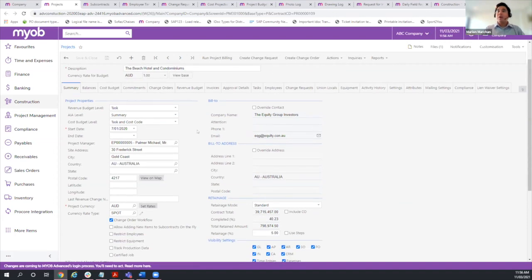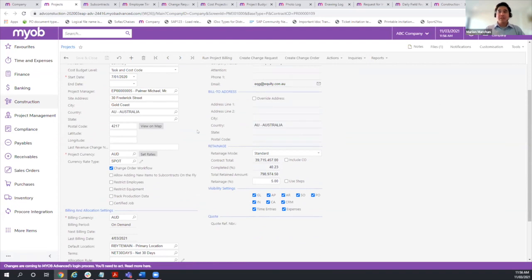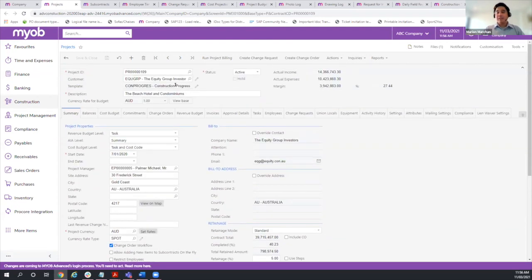Right. Now, the project itself, a lot of the settings here can be templatized, right? So we have the ability to use templates. The way it usually flows is that on the system, we have what we call a project quote, or this can be your proposal or your quote to your customer. And that in itself can integrate to estimating tools like, say, ProEst. If you're doing your estimating manually, you can upload your bill of quantities into that quote, be able to track that, and it integrates with our CRM system too. So essentially, keep track of your pipeline, right before you convert that into a project.